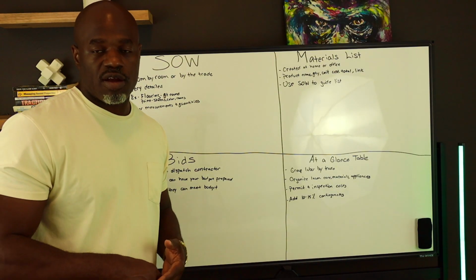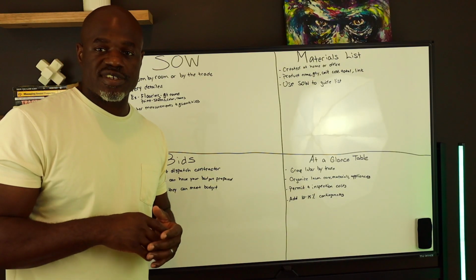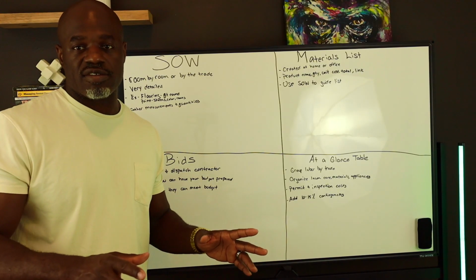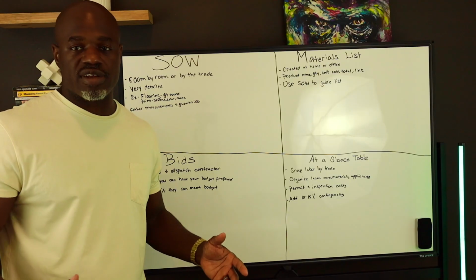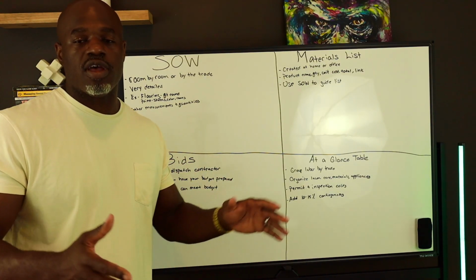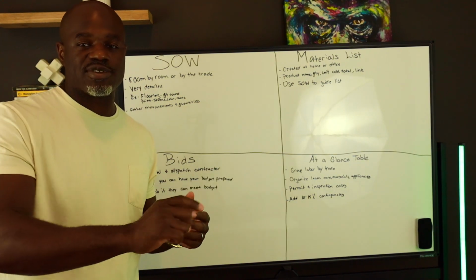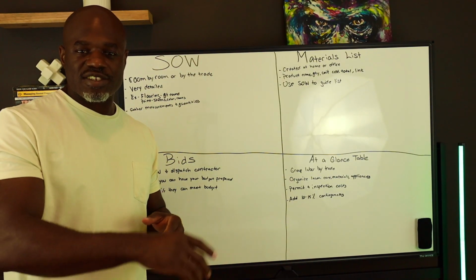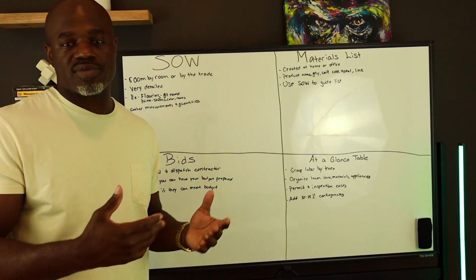With us, typically, our carpenters that we use, they'll install the laminate countertops. If we're going with stone, we'll have a different stone provider. So we'll let them know, just set the countertops, let me know when you're all done. That way we can have our stone provider come out and do their template. We want them to hold tight for a little bit because we want the stone countertop to go on, and then we want the backsplash to go in. That way we don't have to risk any gaps if the guys run their backsplash down and sort of guess where the countertop may end. But you want to get super, super granular. So those are some duties for the kitchen.